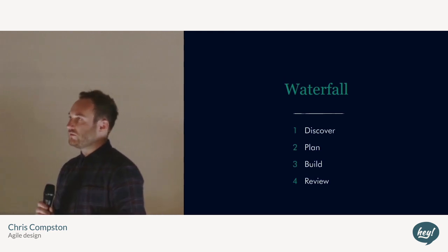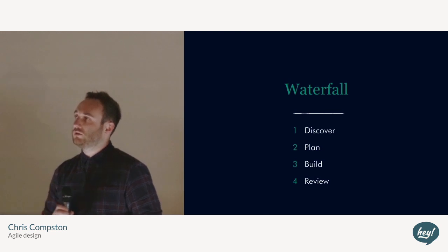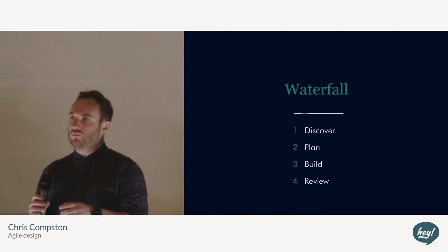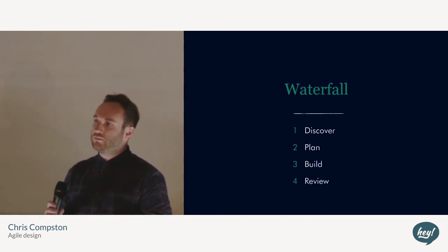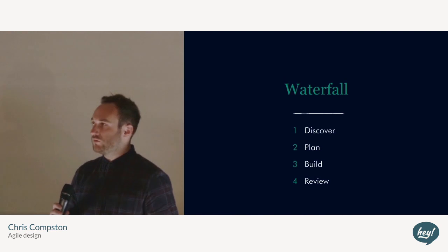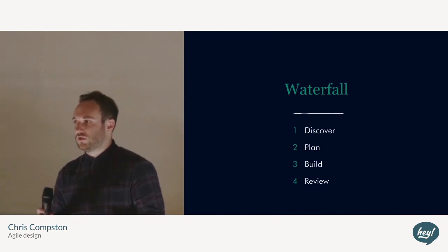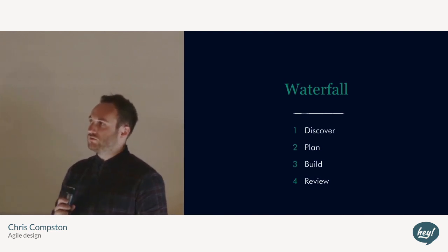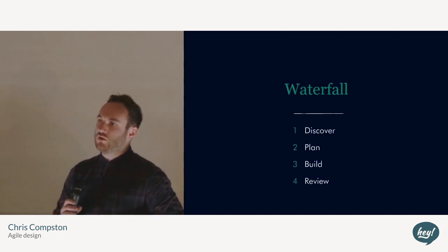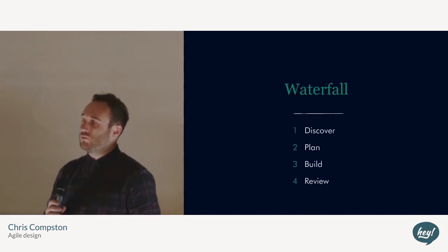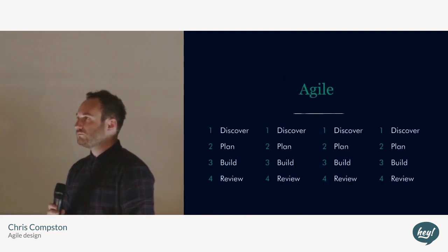Now, a Waterfall process, this is the simplest way you could put it. You start off in a sort of discover phase. You do some research, talk to users, talk to the people who are going to use the product, the stakeholders of the product. You do a bit of planning, design, you do some build, and at the end, review. Now, that process can take 6 months to, who knows, it could take 2 years. And at the end of it, you show the stakeholders your product, and they all go, well, this isn't what we wanted, because you've not shown them anything all the way through the process. So it's a complete waste of 6 months to 2 years.